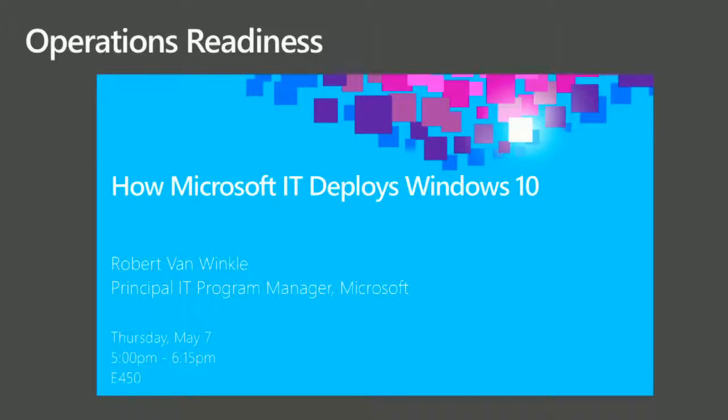On the operations side, getting everyone else in the organization, everyone who's outside of the project, ready to handle the new OS is a good exercise, and one that we almost never do. I mean, we pretty much deploy it and say, all right, help desk, expect a few extra calls, have a nice day. They need to be trained. The desk side support people need to be trained, they need experience, they need to gain familiarity with it. All of those are operational readiness tasks. All of those need to be considered at the same time.